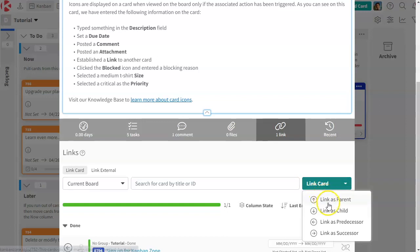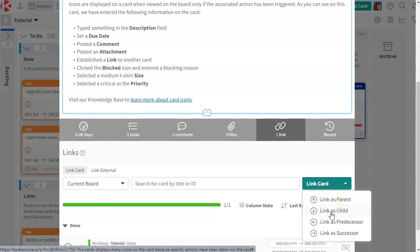Every card that is linked must set a certain relationship. We have the vertical one with parent-child and we have the horizontal one with predecessor-successor, which is to track your dependencies.